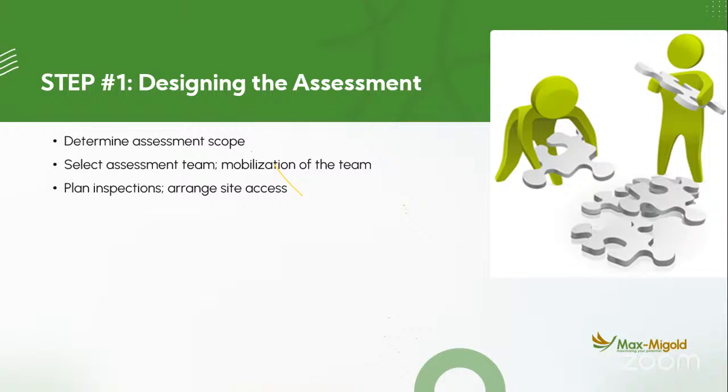the assessment. It is not when you get to site, you start saying, oh, let's first of all check the electrical. No. You first of all make your plan, design your checklist. Are you going to take the building in system-wise manner, or you are going to take the building in component-wise manner? System-wise manner is that you just generalize it. Roof, you just generalize it. Communication,